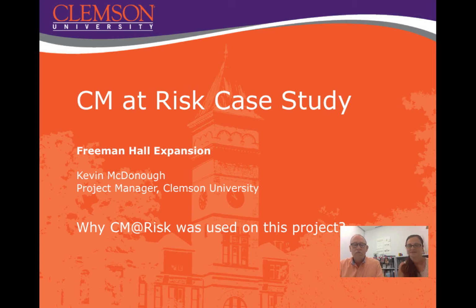Before we get into reviewing our case study today, I would like to give you a little bit of background about how the CM at Risk procurement method is sought after with Clemson University for our projects. Clemson University, being a state institution, is required to follow the state procurement code when it comes to soliciting the services of a contractor.